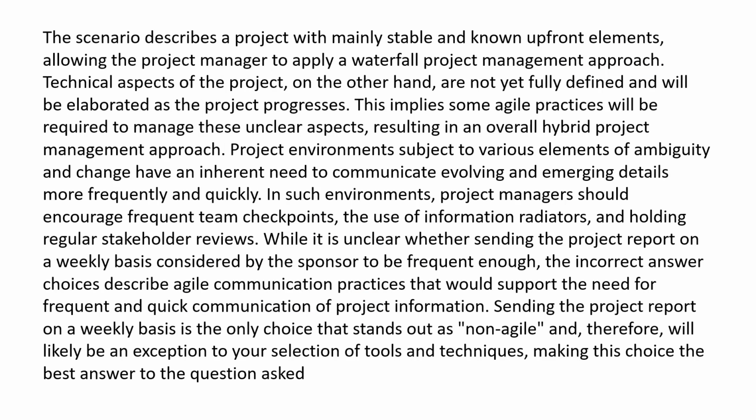The scenario describes a project with mainly stable and known upfront elements, allowing the project manager to apply a waterfall project management approach. Technical aspects of the project, on the other hand, are not yet fully defined and will be elaborated as the project progresses. This implies some agile practices will be required to manage these unclear aspects, resulting in an overall hybrid project management approach.